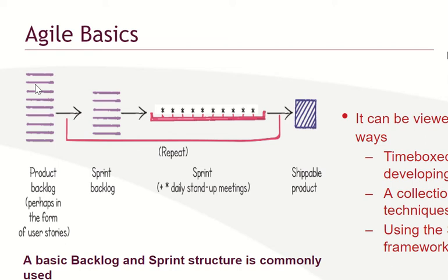And that user story will be, as a user, I want to have an account with the company so that I can always see the record of the things I have bought. I can also get promotional emails on the new promotions they are doing. That's another user story. So we approach agile product backlog, the features of the product, based on what the user aspirations are. That's what they call the user stories.